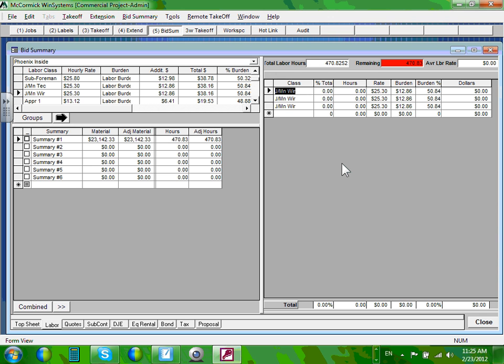Move on. Yes, sir, what's the difference between tech and tech? Tech is the power limited technicians. Those are different crews that you can pick: power limited technicians, journeymen, apprentices, foremen, and so forth. That's how you have to allocate the labor to your equipment. My labor is going to be 3 journeymen and 6 apprentices. Yep, 6 apprentices.